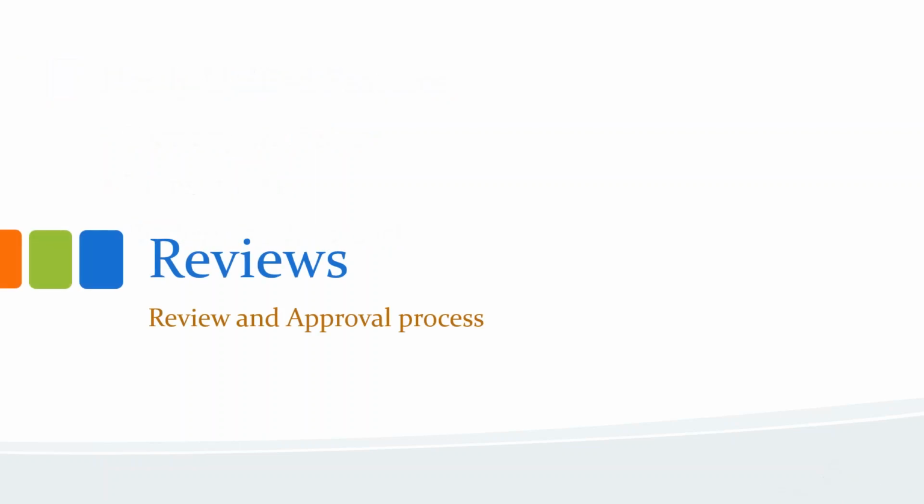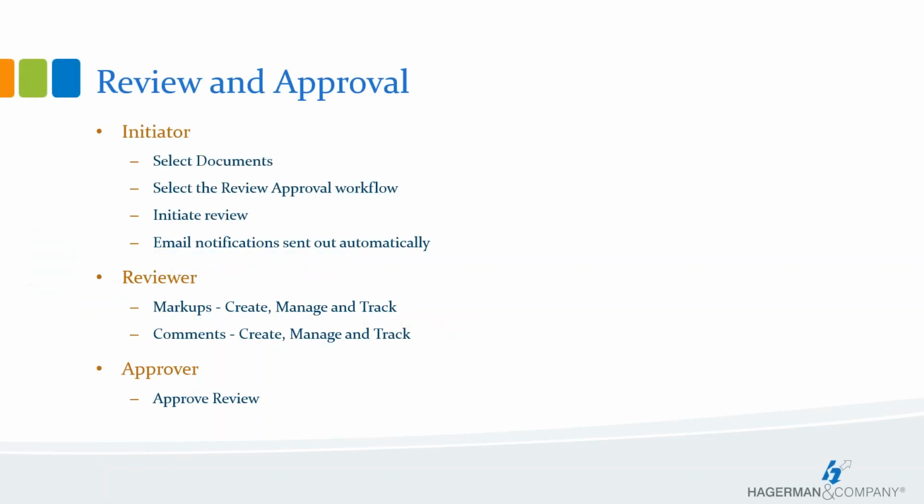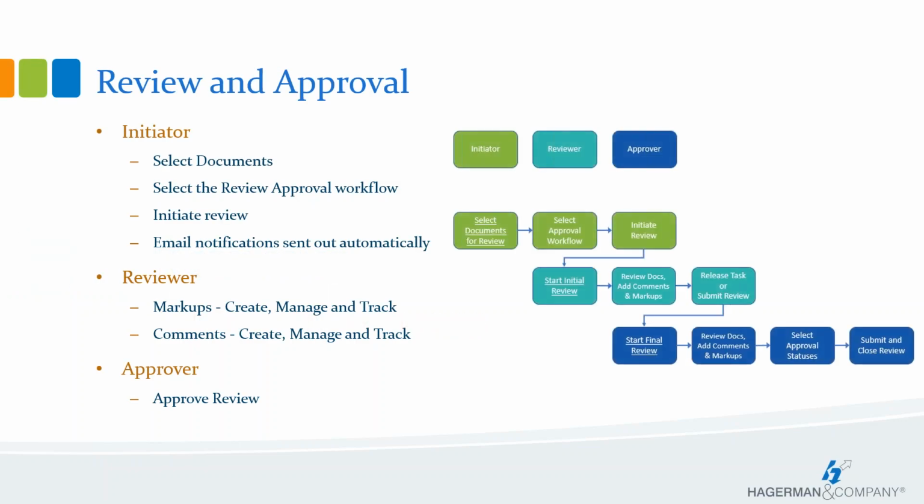The reviews workflow provides project team members the workflow for reviewing, commenting, and approving project documents. The approval workflow feature enables document managers to facilitate, control, and automate the distribution of documents to project members. Members designated as reviewers can then review and comment on documents, and members designated as approvers can give final approval for the documents to be used.